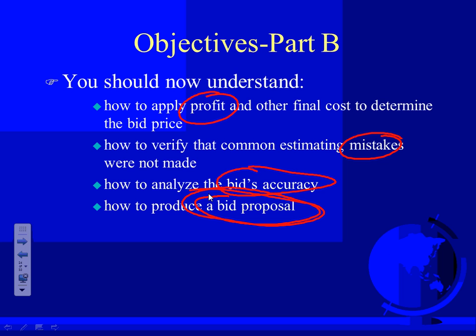In Accubid and McCormick, for feeders, there's an assembly called feeder assembly, and there are assemblies called branch circuit assemblies. If you're looking for a feeder assembly, it tends to be bigger conductors and bigger conduits. This is an assembly of EMT conduit, Adam. If you need an assembly of PVC conduit, no problem. You grab a PVC conduit like this, which the software will have.